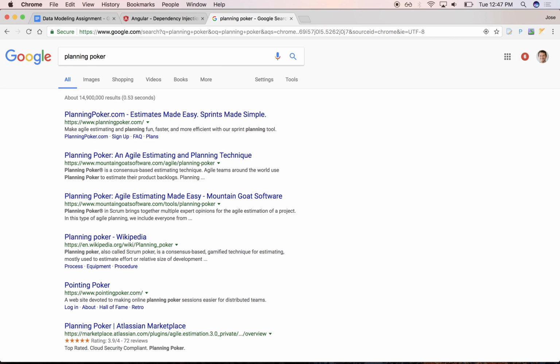And as we progress over several sprints, we look at our previous history, and in our retrospective, we can see that we were way off. That's okay. It is okay to be way off. Ideally, you look at it and say, well, I oversimplified it. I thought that this was really, really simple, but it actually turned out to be fairly complex. And that means that this institutional knowledge stays within the team, and you improve your planning going forward.